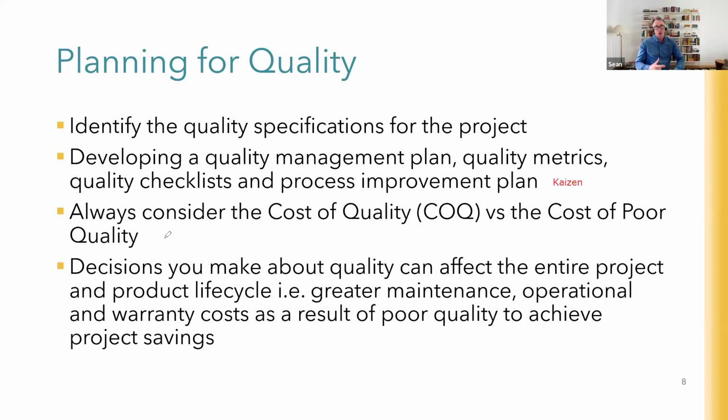So ironically, the quality decisions we made, which were the right decisions, by the way, we forgot to communicate the extra cost of quality to the asset team, and they weren't happy, by the way. And rightly so. We should have let them know that the client, who was their boss as well, wanted something of quality, but they had to get more operational costs for that. So that was an inverse example. But your decisions about low quality, you can't hide the costs. You're only transferring them onto somebody else.